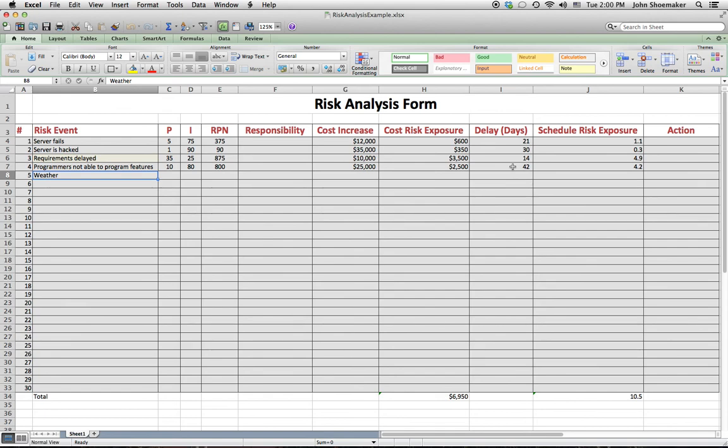You can probably think of a lot of examples in construction, for example. We have bonding and insurance and all kinds of other things. So transference of risk is not a novel idea, and it doesn't work for everything. But there are certain types of projects where transferring risk can be helpful. And the last is what we call acceptance. In other words, basically, we simply say if it happens, it happens.